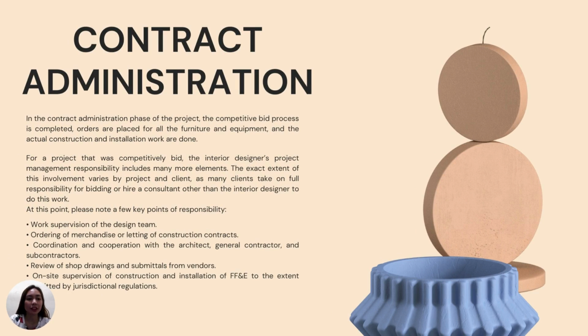Next is contract administration. In the contract administration phase of the project, the competitive bid process is completed. Orders are placed for all the furniture, equipment, and the actual construction and installation work is done. For a project that was completely competitively bid, the interior designer's project management responsibility includes many more elements. The exact extent of the involvement varies by project and client, as many clients take on full responsibility for bidding or hire a consultant or another interior designer to do this work.